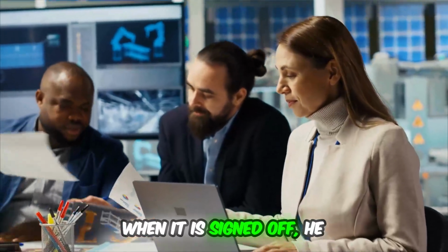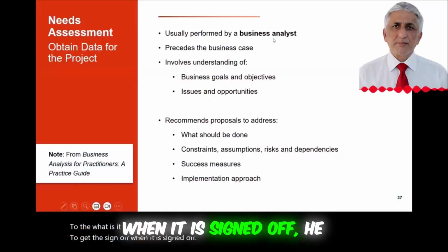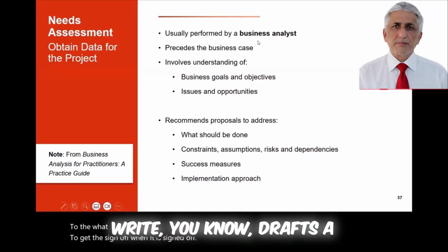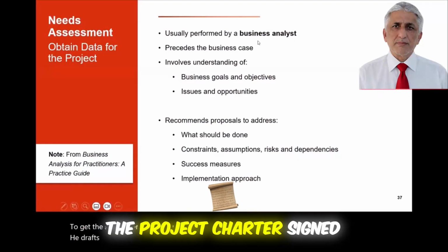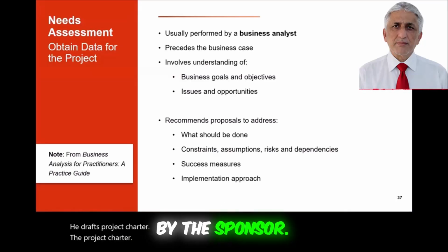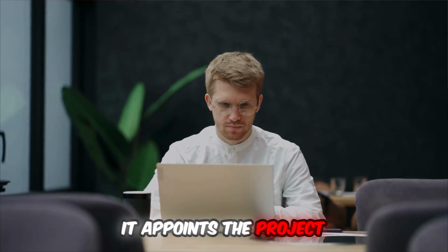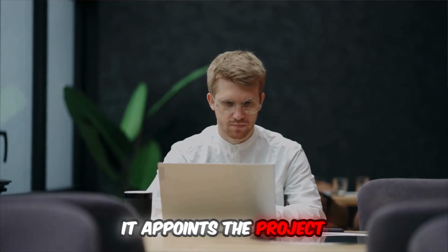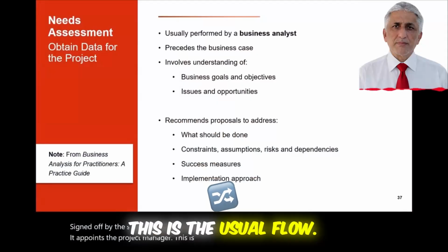When it is signed off, he drafts a project charter. The project charter is signed off by the sponsor. It appoints the project manager. This is the usual flow.